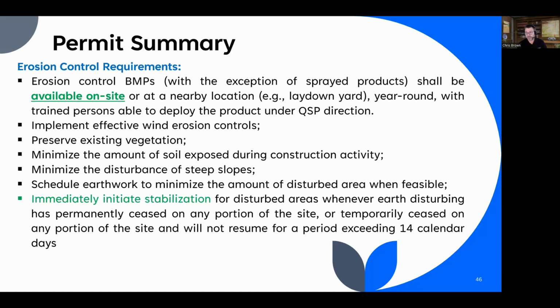For inactive areas, I think we all understand what inactive is, that whole 14-day thing, but a completed area is also inactive. And so there is new, more strict verbiage here that is saying that these areas need to be immediately stabilized. So, if you complete your project and there's this area that's getting hydroseeded and you're going to grow grass, it needs to be hydroseeded quickly and not 2 months from now. I mean, not even close. You could see what it says: immediately initiate stabilization. They put that in there for a reason. They're really tightening down on that.